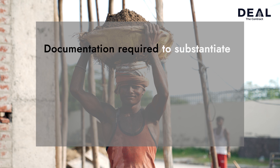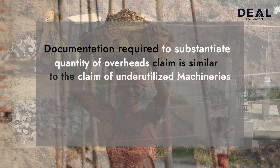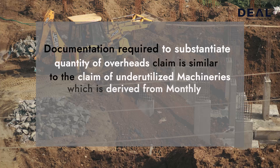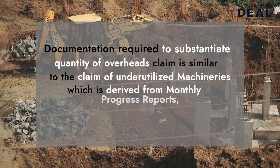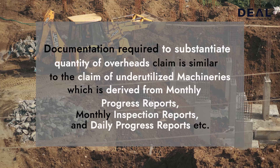Documentation required to substantiate the quantity of overhead claims is similar to the claim of underutilized machineries, which is derived from monthly progress reports, monthly inspection reports, and daily progress reports, etc.